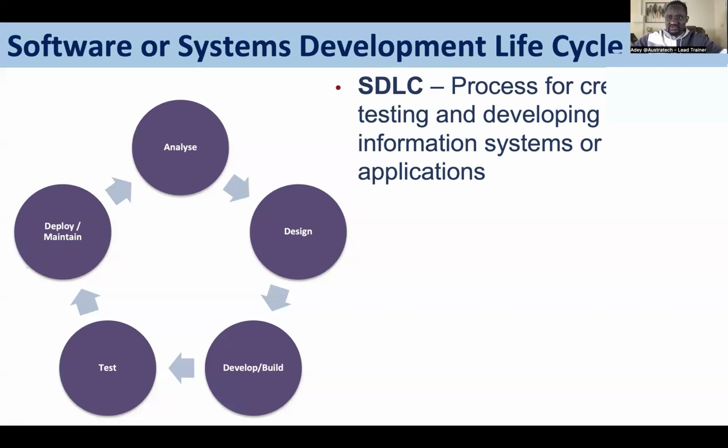completed your quality assurance activities and tested, with the final stage being a user acceptance test, the people that will consume that service or product will need to user acceptance test it. Once they have signed it off, and the product owner or the sponsor, or the business lead, depending on the area or section in the business you are delivering this system or service, and the users in that area are happy, you are then able to go live with that system and deploy it.